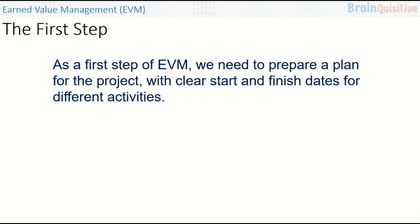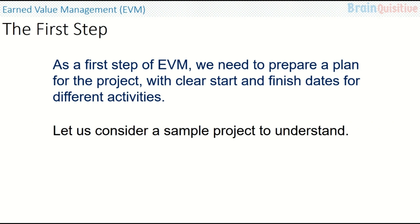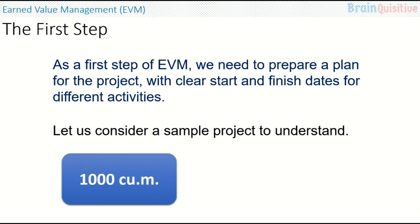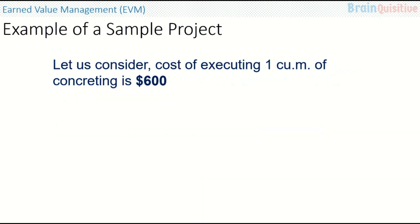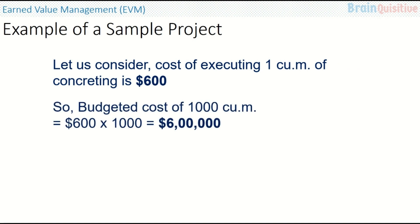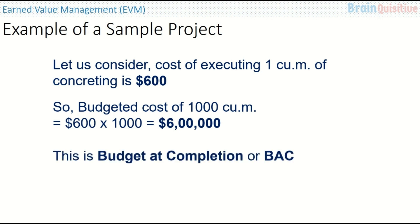As a first step of EVM, we need to prepare a plan for the project with clear start and finish dates for different activities. Consider a sample project where we have to do 1000 cubic meters of concreting over a duration of 5 months. The cost of executing 1 cubic meter of concreting is 600 dollars — this is the budgeted cost per unit. So the budgeted cost of 1000 cubic meters is 600 multiplied by 1000, that is 600,000 dollars. This is the Budget at Completion, or BAC.